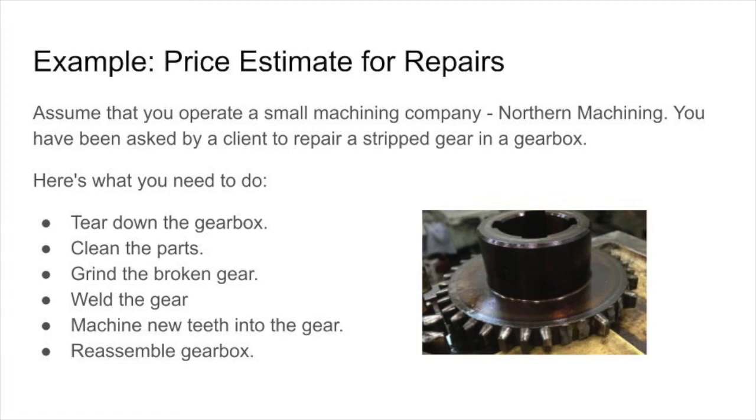Assuming that the gearbox comes into your shop, you don't need to take anything else apart. You need to take the gearbox apart, clean the parts, grind the broken gear, weld the gear, machine the teeth in the gear, and reassemble the gearbox. So we just break it down into its basic stages. Each one of those basic stages takes a certain amount of material and a certain amount of time.